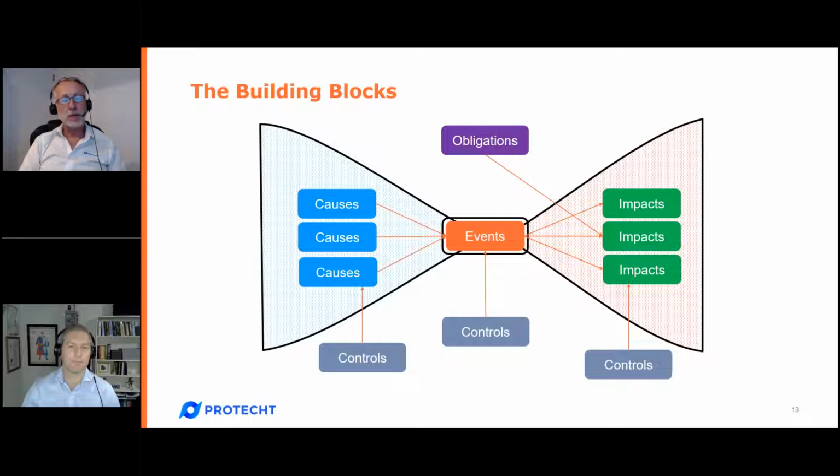It just reminded me when you were saying that, Michael, is that getting really practical. One of the common things we do with new clients is that they usually send us their existing risk register in an Excel spreadsheet. I'm going to be very visual with you. It's now got risk. We add a few columns to the right. The first column is what is this? And we have a drop-down box that has on it causes, events, impacts, failed processes, and controls. And as Michael said, if we had then said something like failure in the firewall or failure to reconcile, we would go, what is this? A failed control. So we do all of that, and then we extract from there the events, and the events are the only ones that get carried forward into the register as a short name.